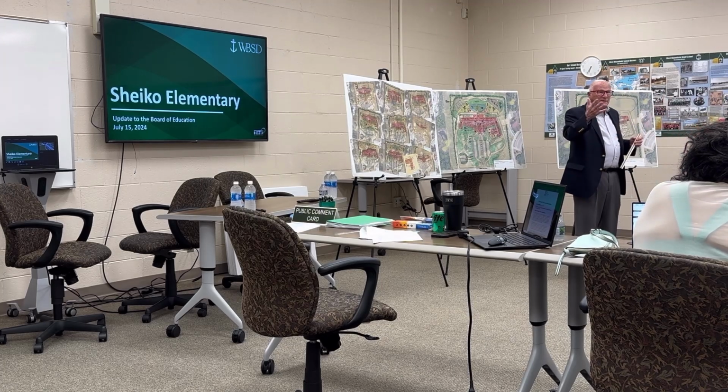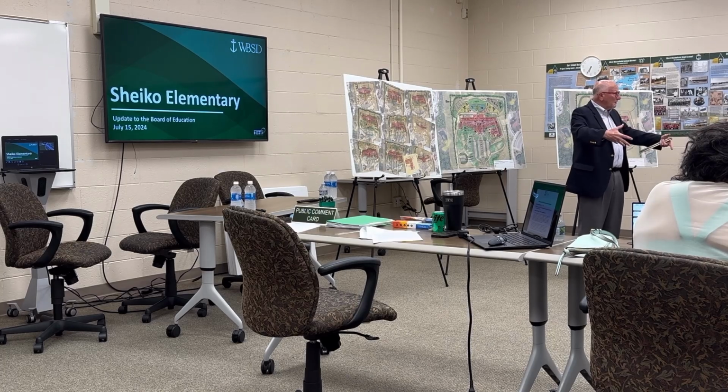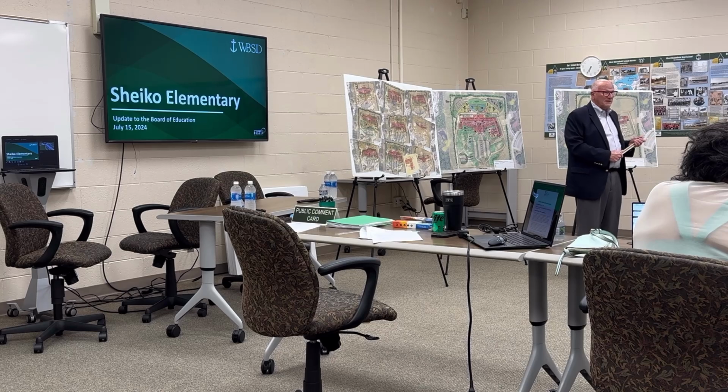And right now, I think, Jamie, they're like 52 weeks out or something. They're incredible. No, it's almost approaching 2 years now. Is it 2 years on that? Yes. See, I'm out of touch with it, but we need to pre-order some of those kinds of pieces so that it's available and we're not just waiting for those kinds of things.